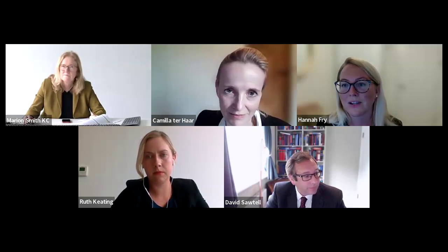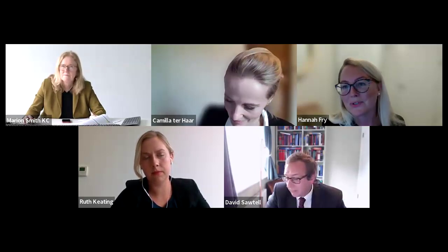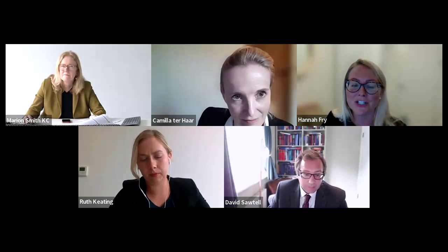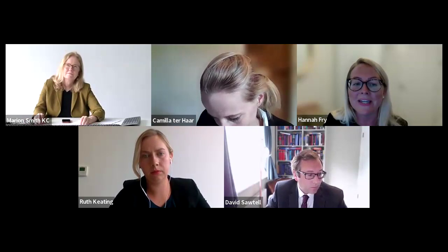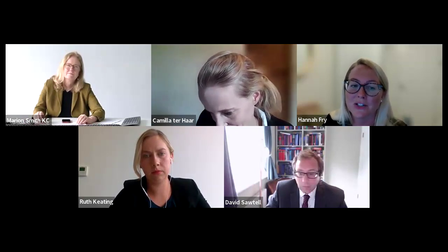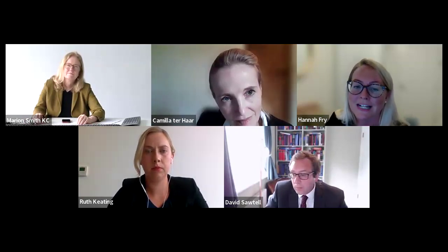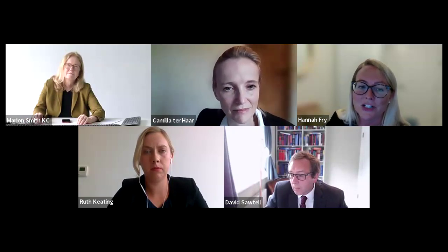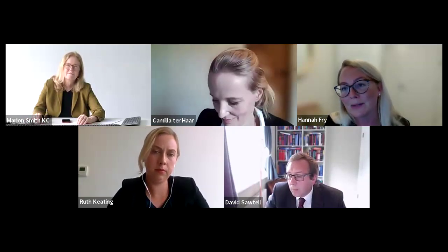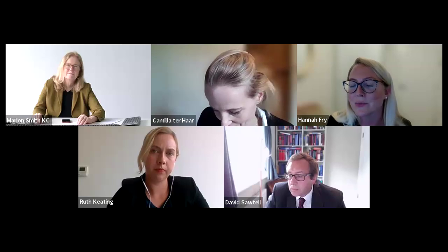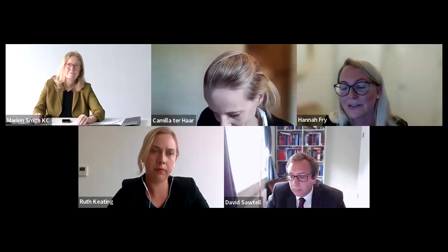Hannah. Thanks, Marion. So in terms of insolvency and termination, the JCT 2024 helpfully brings in line with recent developments such as the Corporate Insolvency and Governance Act, the inclusion of new termination events post-COVID and triple point. The one to watch may be the development of Article 3 and any differences with the good faith obligation in NEC3.